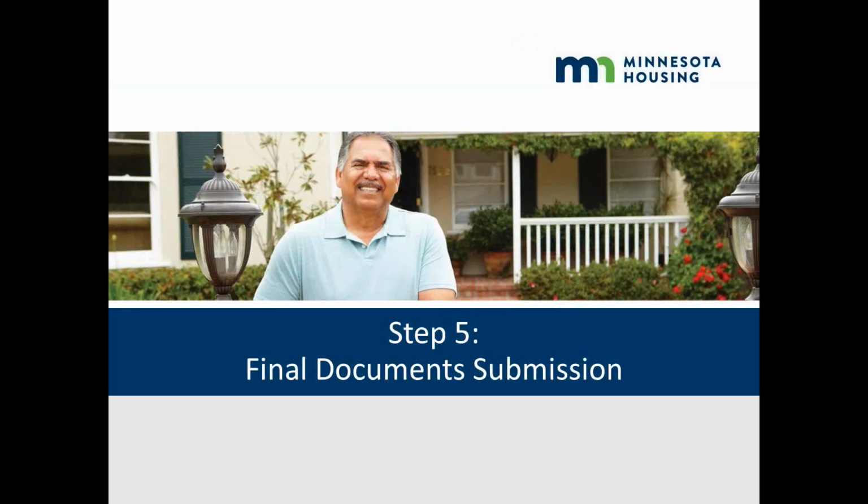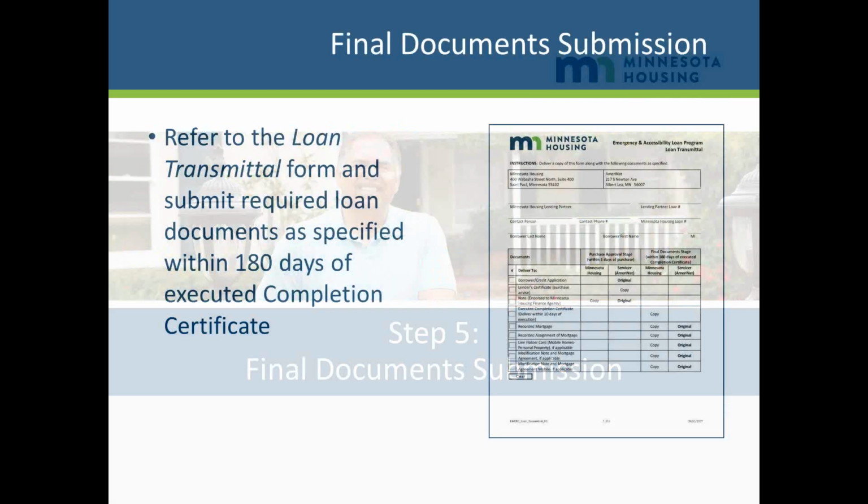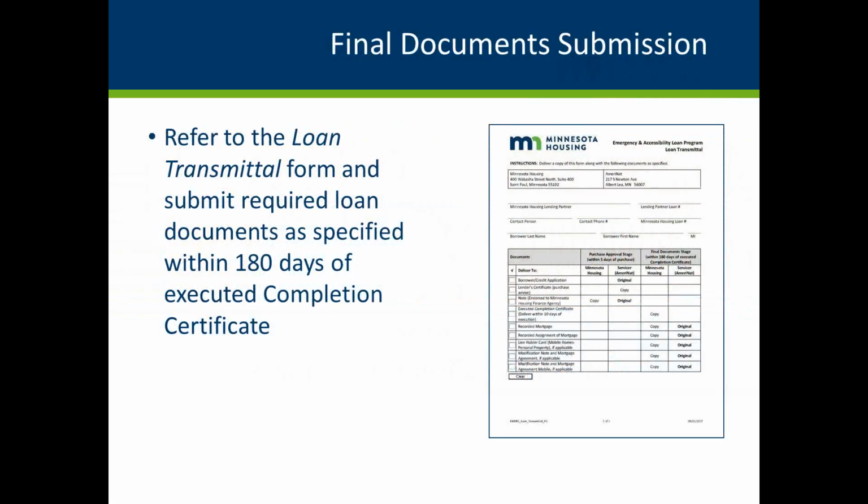Step 5, final document submission. When the project is completed, you will need to send in the final documents of the loan file within 180 days after the completion certificate has been executed and signed. Refer back to the loan transmittal sheet to determine which documents need to be sent at this stage and where to send them.